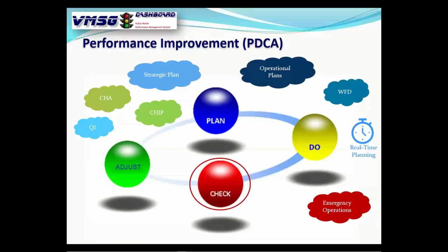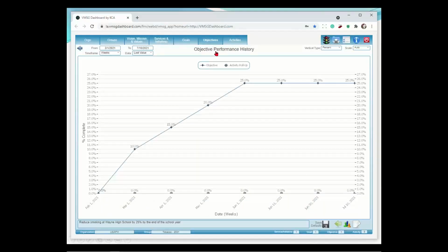So we go back to our PDCA cycle. We're going to go into the adjust phase. In the adjust phase, we're going to make any corrections necessary. Well, the good news is everything's working beautifully. We don't need to make any adjustments, so we're not going to change the plan. We're going to continue on with the execution, come back, let's say on a monthly basis, and check it. You determine what this is. The cycle can be monthly, quarterly, whatever you determine. So in this case, we're going to check it again. If it's still on track, we're just going to go through the cycle, keeping an eye on it here. Now let's go back and look at a slightly different example here.